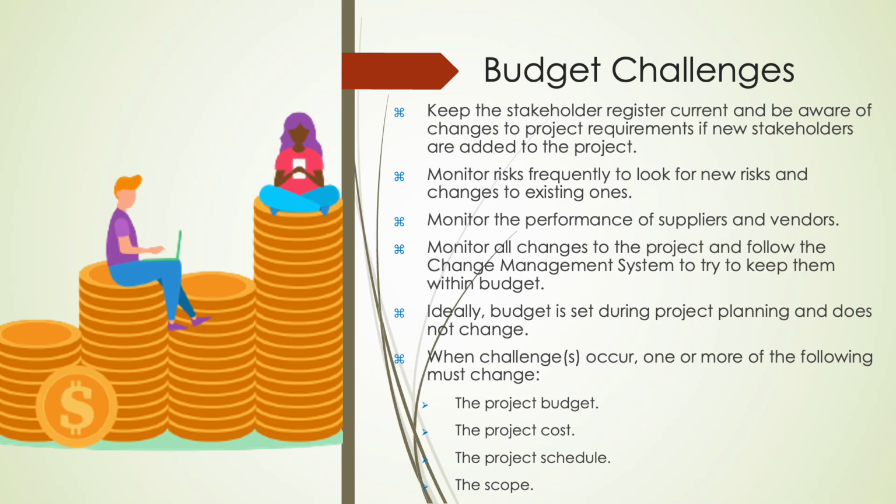Once the project management plan is baselined, any proposed changes must be carefully evaluated. The process starts by submitting a change request, which is formally documented and reviewed. Not every change request gets approved. Some are rejected if they conflict with project goals or constraints. If a change request is approved, it triggers updates to the project management plan and possibly to project documents as well. Throughout this process, it's important to maintain tight control over communications.